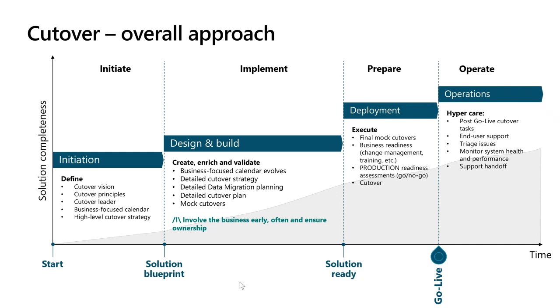If you think of the project in terms of 4 big buckets: the initiate phase, the implement phase, the prepare to go live phase, and the operate phase, during the initiate phase you would be defining your cutover vision, the principles you're going to be following, the definition of the cutover leader and their role, getting your high-level cutover strategy defined, and as part of that, defining your business-focused calendar. And we'll go into more detail about what each of those means from a Microsoft perspective.